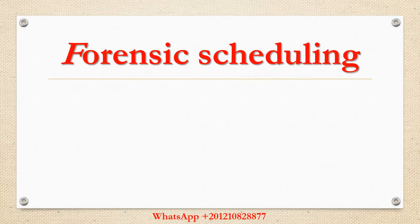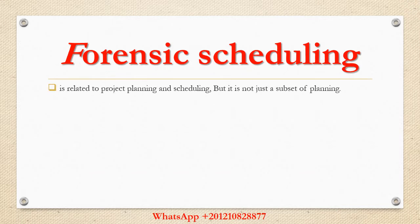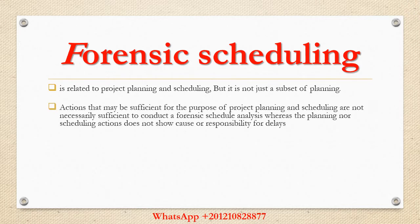Forensic scheduling is related to project planning and scheduling, but it is not just a subset of planning. Actions that may be sufficient for the purpose of project planning and scheduling are not necessarily sufficient to conduct a forensic schedule, whereas planning and scheduling actions do not show cause or responsibility for delays.